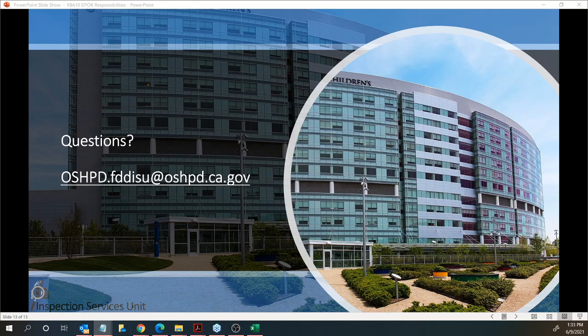So, Robert, thank you again for your question. Back to the code, 7-153 is about all types of change to the approved construction document. All types of change can be ACD, or can be a non-material change. When we say ACD, it is an amended construction document, and that is a material change. The non-material change is also in 7-153 section B, for non-material change of the work.